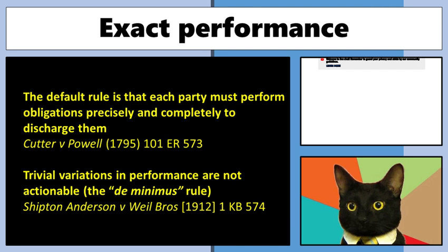All right, but just make note that if that was to go to court, the courts would tell them to go away, or at least the contract would be considered, from my end anyway, to have been discharged by performance. All right, so that's the first rule you got to tuck away in your head. Contracts can be discharged through performance, and that means that your obligations come to an end, even though there's a tiny little bit left. All right, in most situations.